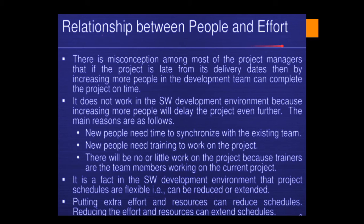There is a misconception among most project managers that if a project is late from its delivery date, then adding more people to the development team can complete the project on time. But this doesn't work, because adding new people means there is a learning curve — the time taken by newcomers to learn the project and synchronize with the work will delay the project further. New people need training, and the trainers are the existing team members, so even their effort will be reduced. Adding people is not a solution to achieving the project on time.